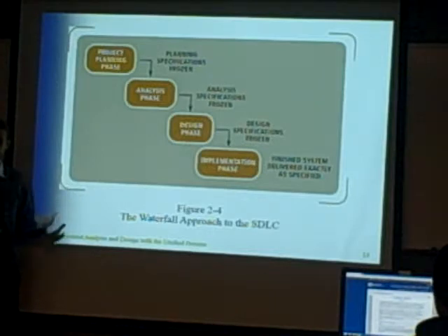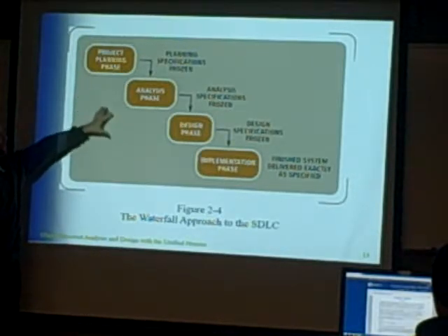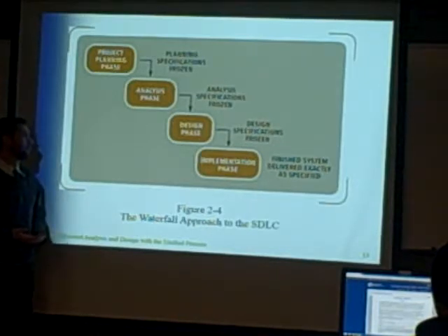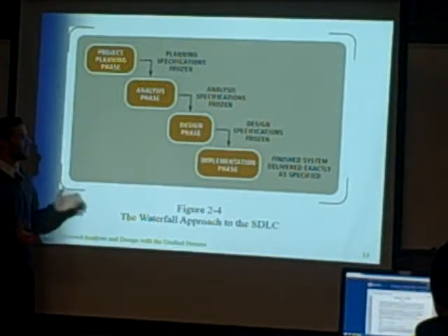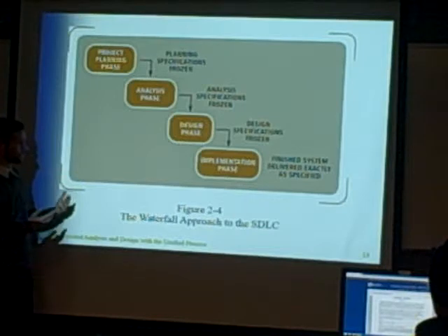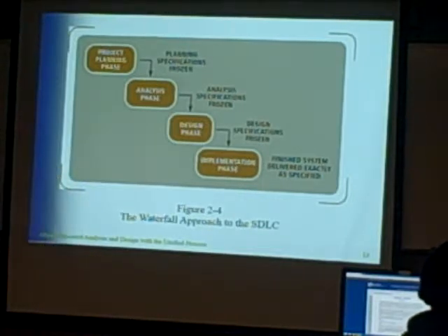But if it's something that's going to take 5 years, the scope of it is so big that there's a lot of risk in approaching things in this fashion. It's too much to bite off if you're going to make it really big. So today, typically, organizations try to target like a 6 month project as their size, so that they've got a greater chance of hitting it or failing earlier. All right, so this is the waterfall approach.